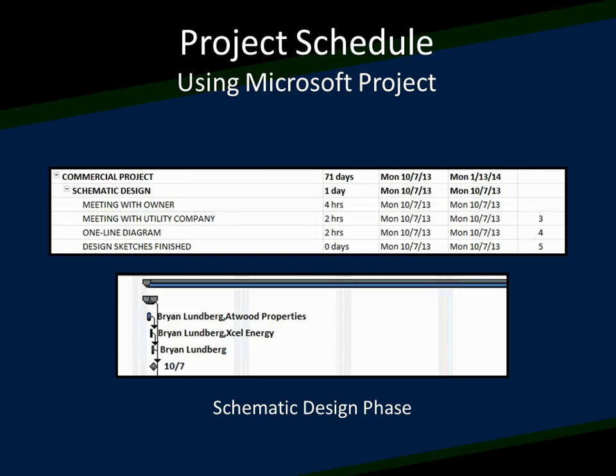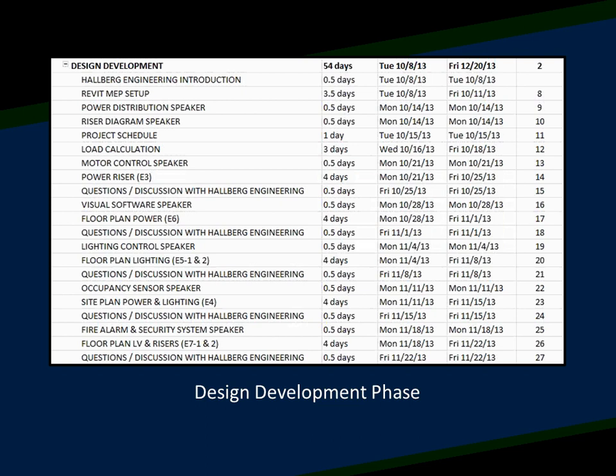with the tasks. But as you can see here, this is our design development phase, or most of it. It actually was way too long to put on the page. But you can see here, we went in and we're adding in durations and making sure that the schedule actually lines up with the schedule that we had. So everything that you see here is actually following very closely to the dates for how we actually went through designing this project. And you can see that kind of at the end of every week, on like Fridays, we had a question discussion time with Paul Berry Engineering, and all of our speakers that came in are also listed